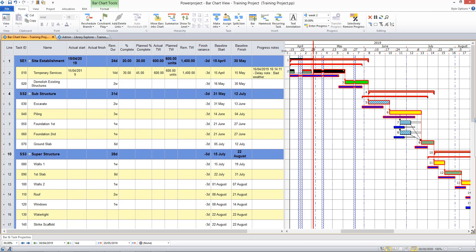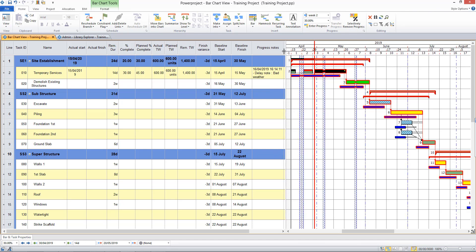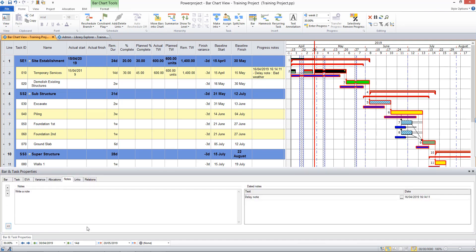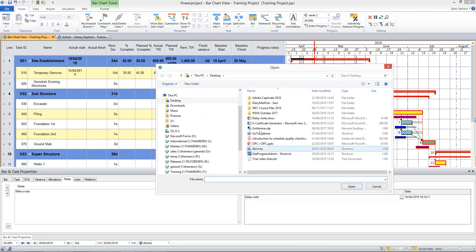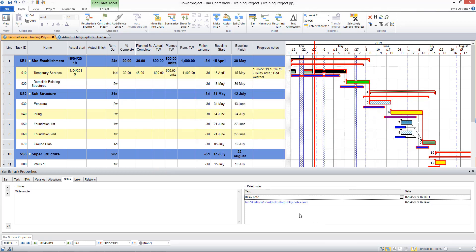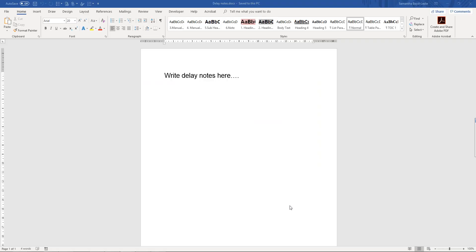Alternatively, you may use other documents to record delays, and you can record those documents in Power Project. So you can choose to enter a URL or to link directly to a file. So in this case, if I choose the new file note and I navigate to a document in my project, I would be able to click on that at any time and open up the document within Power Project. And this would be useful if a site diary is maintained or something like that, and you can update it as you go.